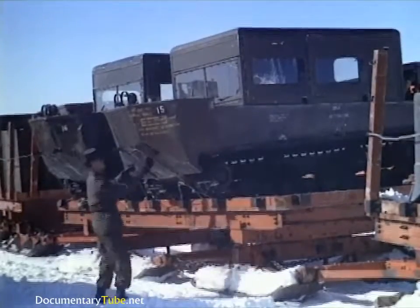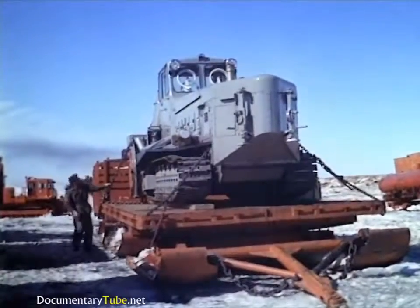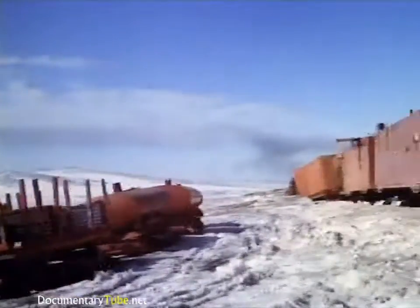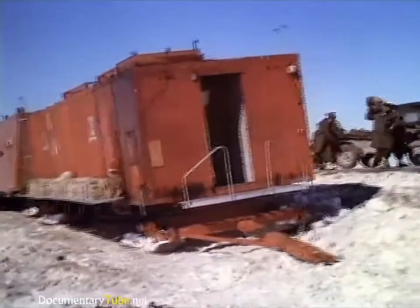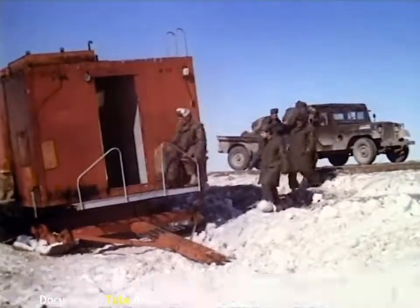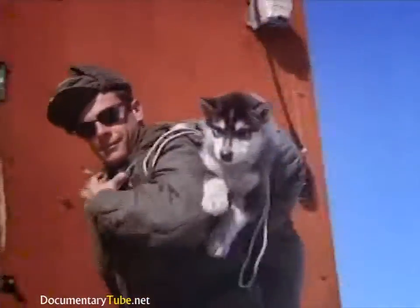Even the vehicles we used at the site had to be transported over the ice on big bobsleds. We called these convoys of 10 and 20-ton sleds heavy swings. Crawling up the ice cap at approximately 2 miles an hour, a heavy swing would reach the camp in about 70 hours if everything went well. We used wooden caboose-like trailers, wanigans, to house members of the construction crews for the 3-day trip. Mukluk, a 3-month-old Eskimo sled dog, went along as camp mascot, strictly against regulations.